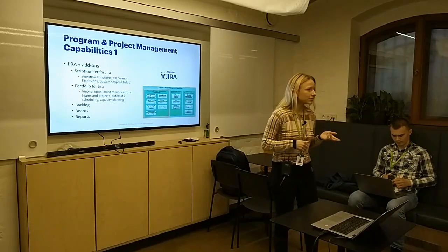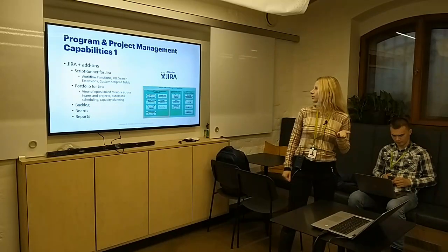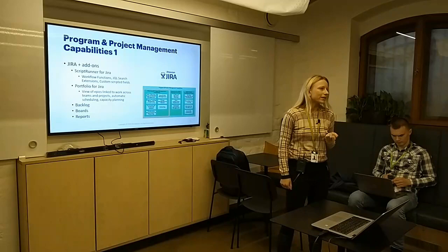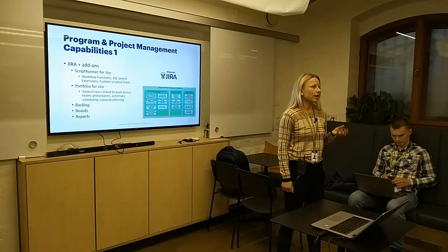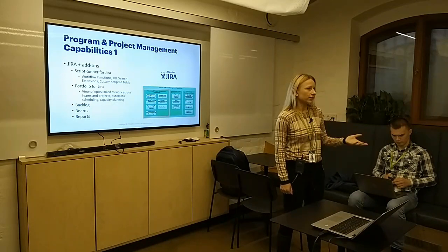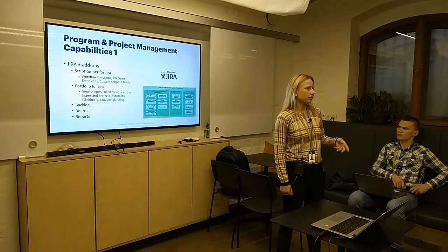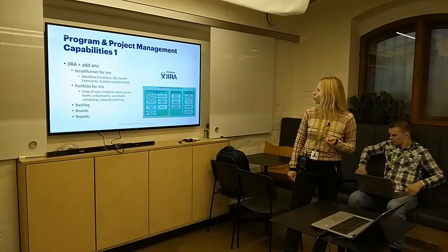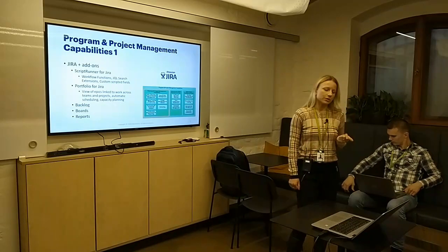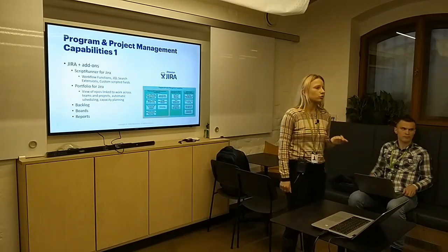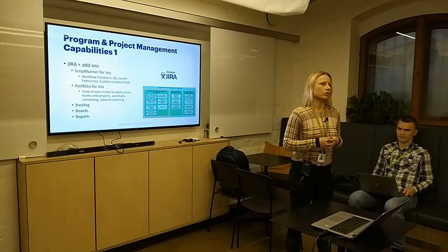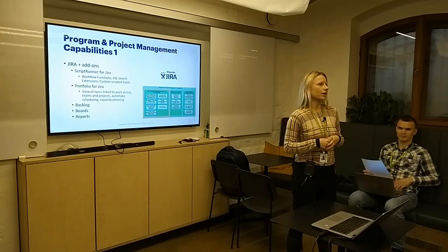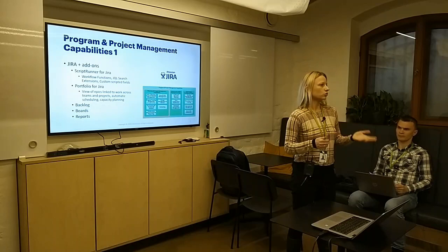With this component, we enable many things. We enable planning and scope management as well. Teams plan the work inside sprints, move tickets to the board, to the planned iteration, or plan a full increment each sprint. We also implement change management and control. All the issues are registered in Jira, everything is registered with acceptance criteria, and all change requests are there.